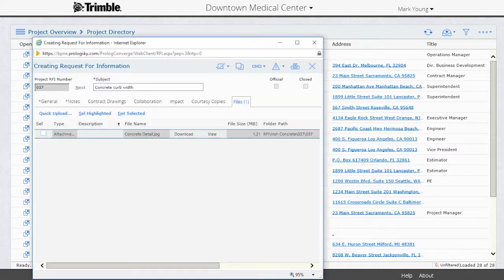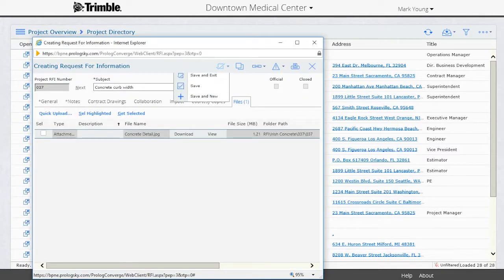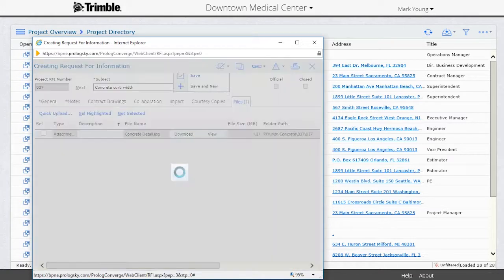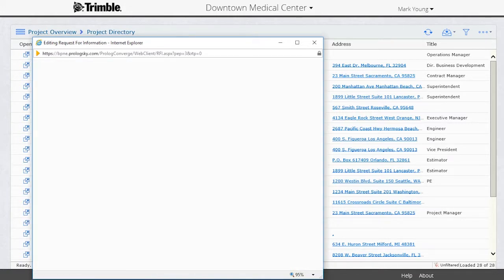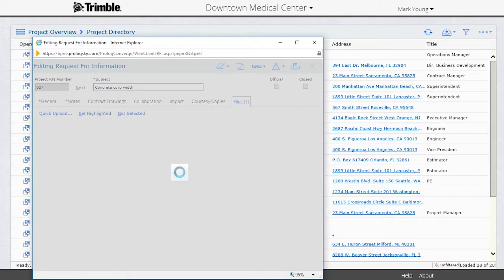Once the RFI screen appears, click on the Save button to save the RFI and the attached files. At this point, the project manager will be notified by Prolog that a new RFI has been created and is ready for response.